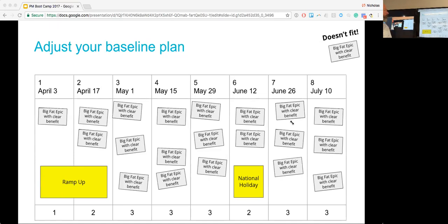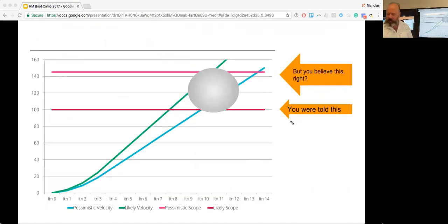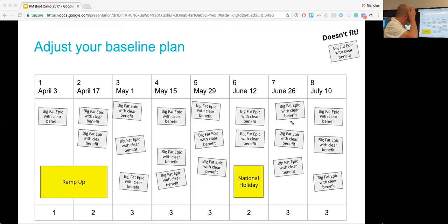Well, I don't know. Wow, that took a long time to change. To me, a spike is usually a small time-boxed piece of work where the outcome is not value, but information and actually a decision. So if you know that you have an epic here, you probably have a story to spike it here. If the spike is a whole new technology or a whole new unsolved problem, then a spike could be of epic size, but normally that's more at the iteration planning level. We are not at that level now. We are right up in the aeroplane, looking down. Does that make sense, Jacksha?